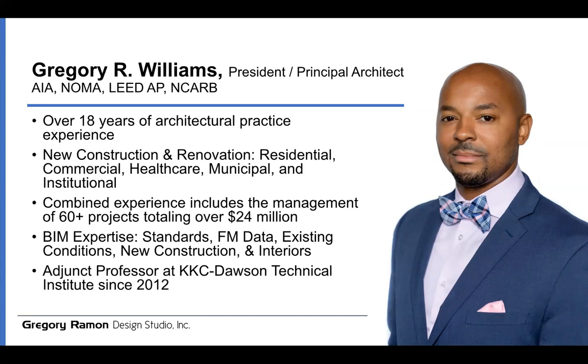And one of the things, I don't know if anybody on the call has used self-certification or self-certified architects in the past, but in the past they had a really fast and expedited method of getting permits out. I think it was like two weeks you could get a permit on certain residential projects. They have discontinued that expedited path, where now it's typically a minimum of 30 days on a self-cert project. And we've had good experience just going through the standard plan review on projects again.